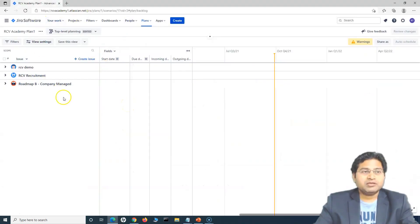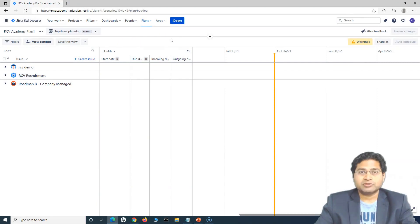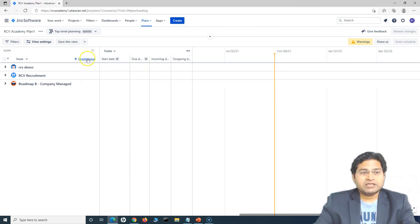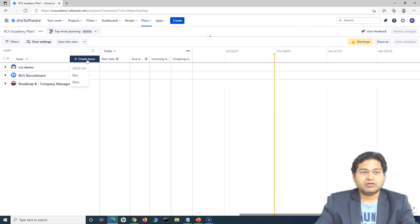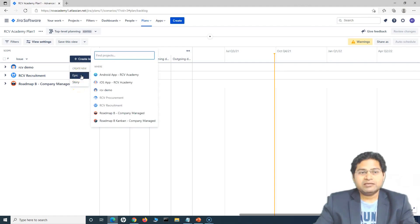So I'm here in the Jira roadmap — this is the advanced roadmap, the paid version. To create an issue, you will clearly see that there is a create issue link here. We'll simply click on it and then you can create an epic or story. So let's go ahead and create an epic. I have already created two different projects — iOS and Android.